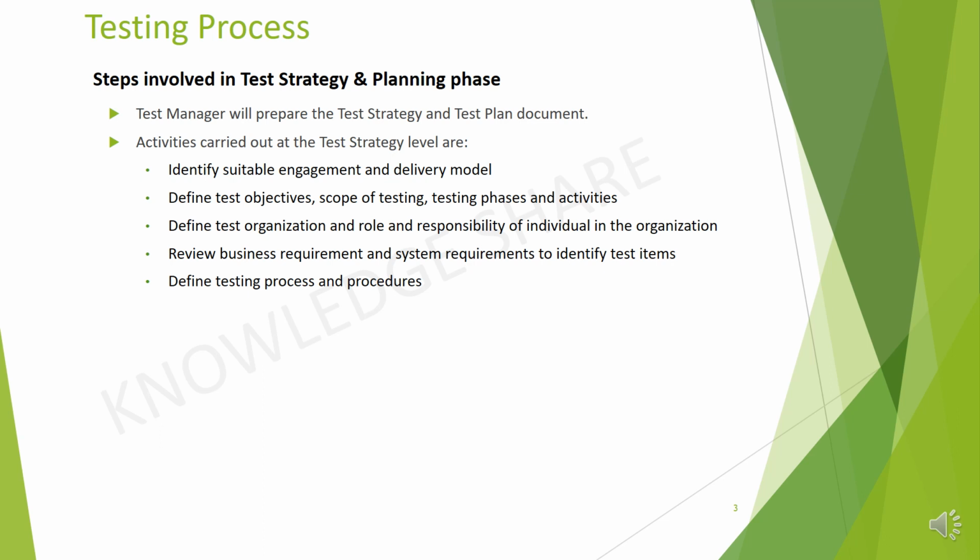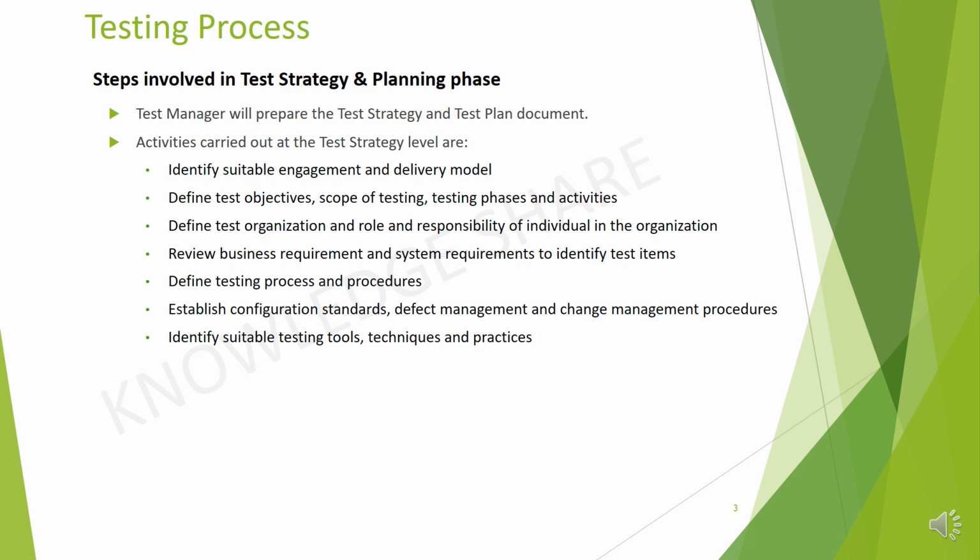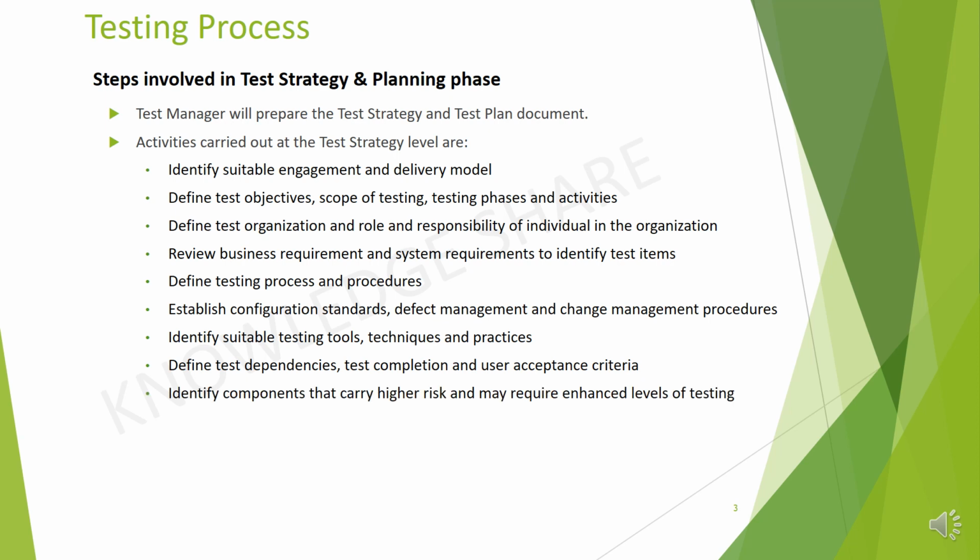Then, define testing process and procedures. Next, establish configuration standards, defect management and change management procedures. Next, identify suitable testing tools, techniques and practices. Then, define testing dependencies, test completion and user acceptance criteria.